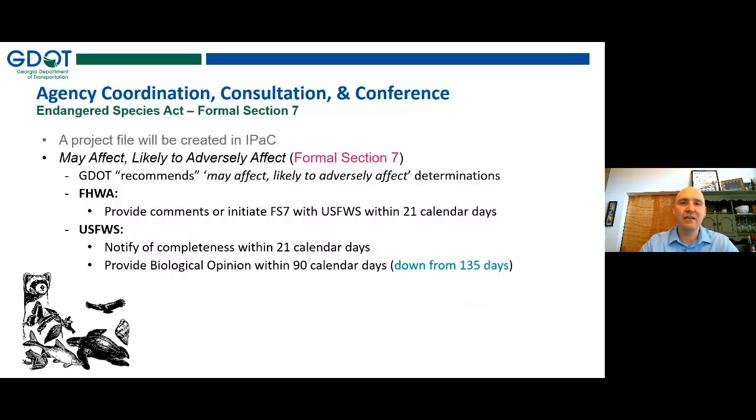And 90 days seems like a lot, but when you consider that it used to be 135 days, that's a pretty significant time savings. That's a month and a half that you're saving on your project schedules.